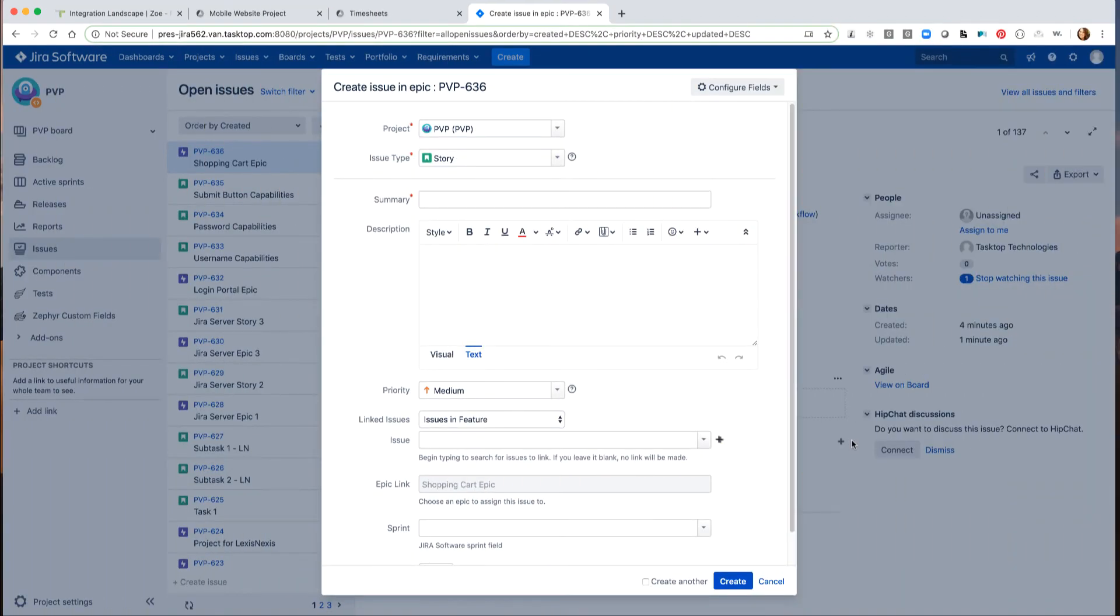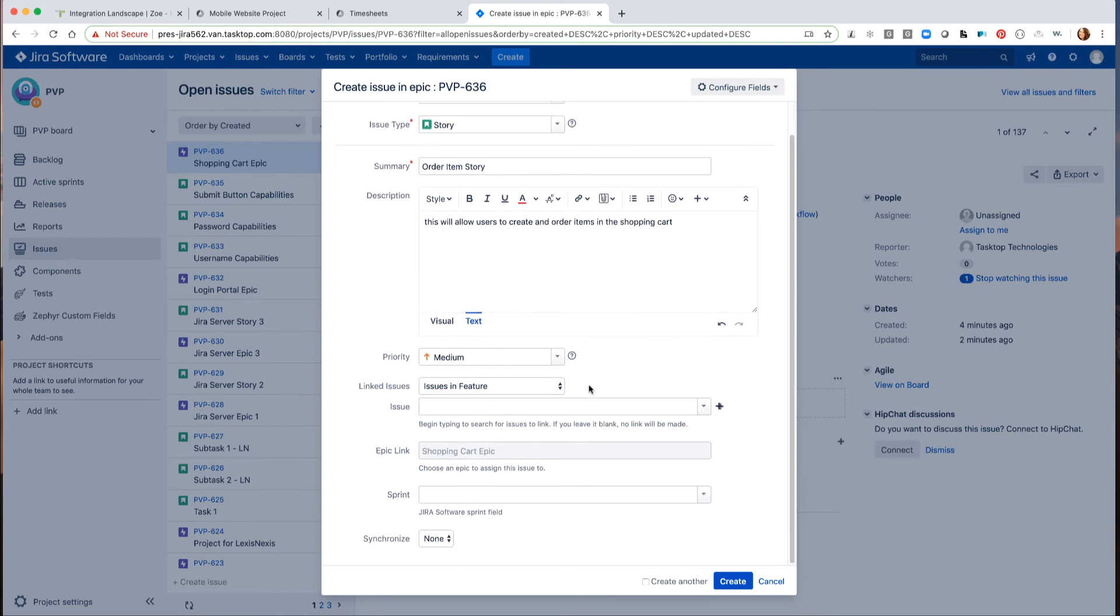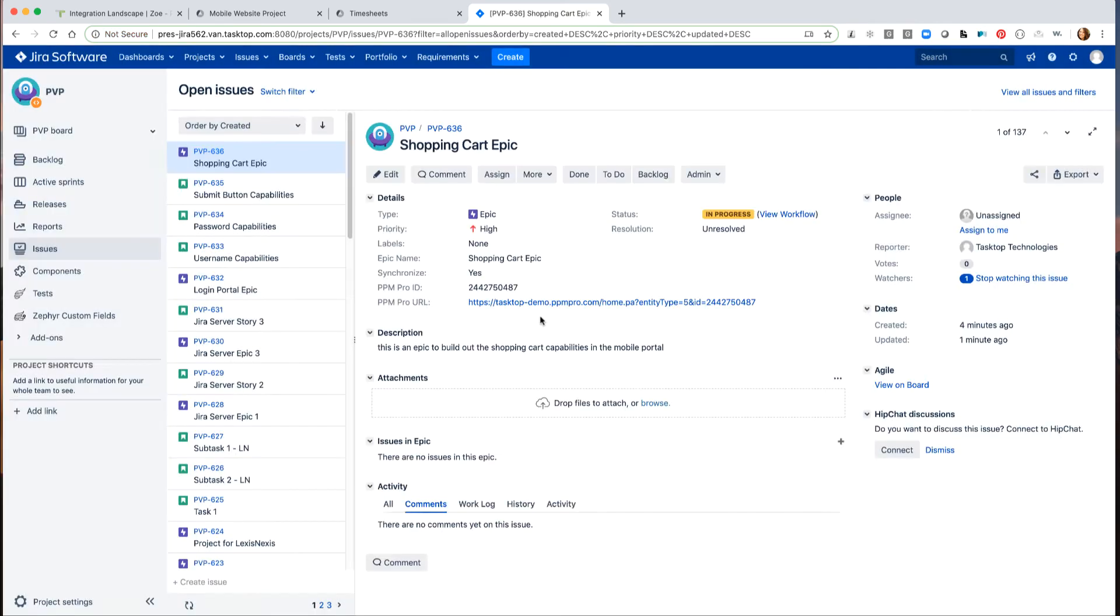Now the developer team lead can start breaking down our epic into stories and add details to each story. He labels the first story, order item story, and adds a brief description. He assigns a priority and chooses to synchronize the story with PPM Pro.